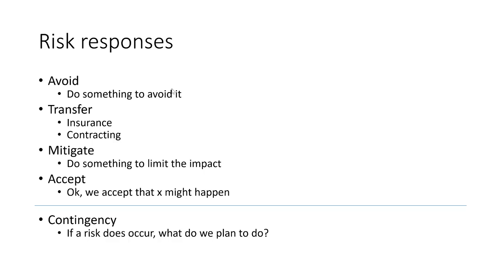Yep, we might run out of gas. I accept that might happen. Usually we do that if the risk is A, small and not really worth spending the money to mitigate, transfer, or avoid, or B, too big. And it's truly whenever the cost to mitigate, transfer, or avoid is greater than the cost of the risk itself.